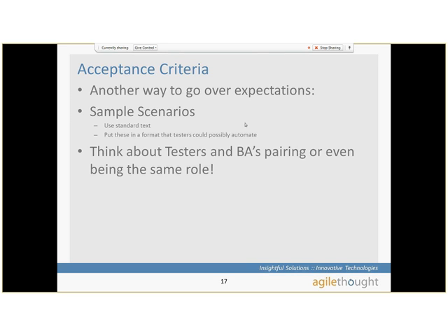help with that is, a lot of times on some of our teams, before an actual sprint planning, a subset of the team would go over user stories along with the product owner for an hour, the stories that are upcoming in the sprint and maybe a couple more that we think we might get to. Go over them. The team would ask any questions, clarify what is meant by those different user stories, and give the product owner some questions about their acceptance criteria and allow them to really hone the acceptance criteria. So when we got into planning, there were a lot less surprises.